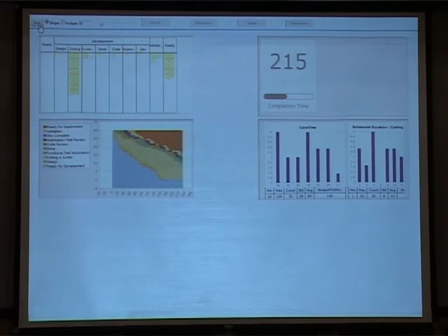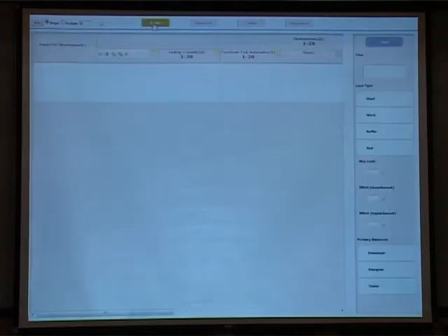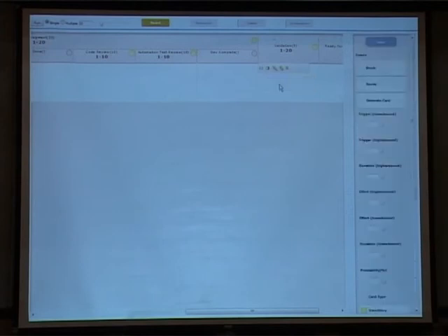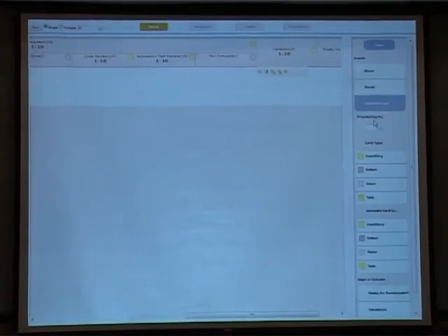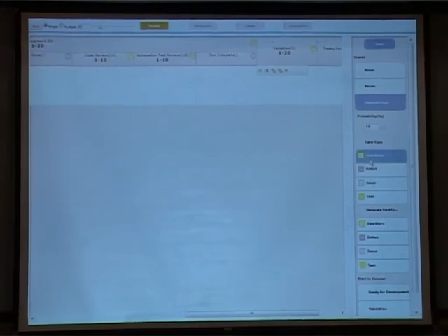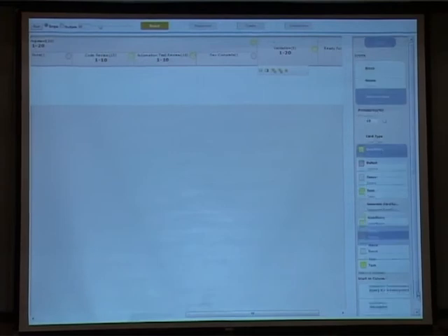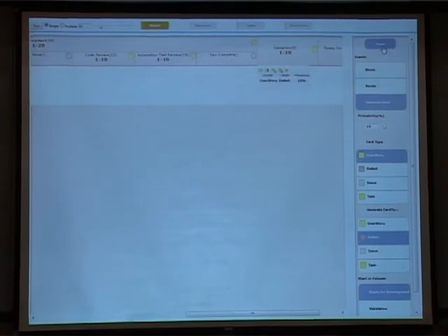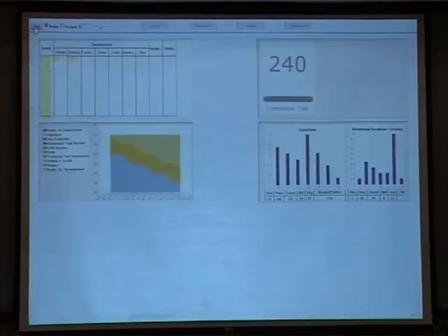So you can do these kinds of scenarios, and something even cooler, you can go to the board and say that from my testing lane, my validation lane, there is a 10% probability that when I am testing my enhancements, I will get a defect, right? So you are not only going ahead based on the fixed backlog that you had at a point in time, but you know that in reality, when I do this project run, I'm going to get defects introduced into the system as my cards keep getting tested, right?